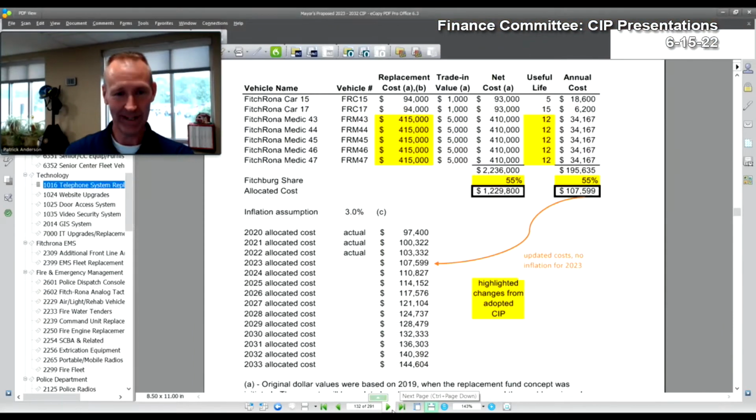So we're about to find out, because I am not going to see that ambulance in 2023. I have been told that. So we're moving it to 3 years. That is not intentional. That is just the way of the world. I don't have any other options beyond that. So truly what this will do is switch it out to a 12-year replacement program, but that's still actually replacing an ambulance every 2 years and keeping it for 12 years.